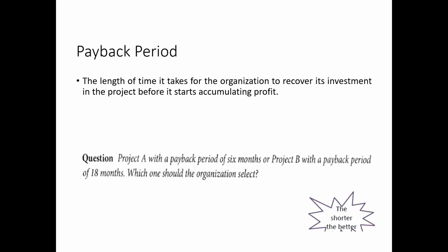Okay, payback period: the length of time it takes for the organization to recover its investment in the project before it starts accumulating profit. So this is called payback period.